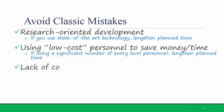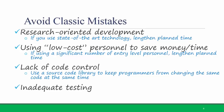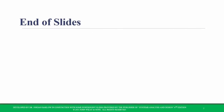A third mistake to avoid is lack of code control. You may think that you can rely on your responsible programmers to coordinate with each other on when they will be editing the code, but it's best if you can use a source code library to keep the programmers from changing the same code at the same time, such as those discussed on the previous slide. The fourth classic mistake is inadequate testing. You need to always allow sufficient time for formal testing of your system. If you can avoid these classic mistakes, your programming process should go very smoothly.